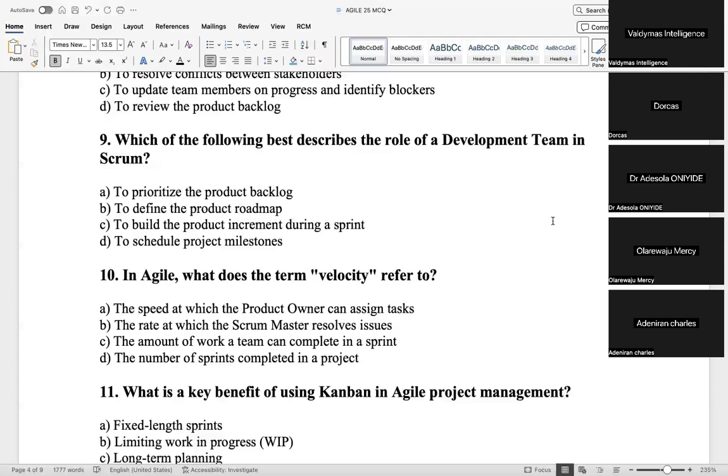Yeah. So when we have 10 user stories, what we do with the team is that we all estimate the points. When we estimate the points, there's something called the Fibonacci sequence that we use. You can just go online and type Fibonacci sequence. You just see it: 1, 2, 3, 5, 8, 13, where the next number is the sum of the last two numbers. So 1, 2 will give you 3.